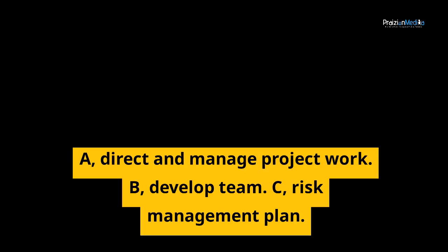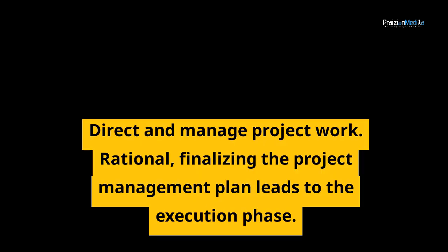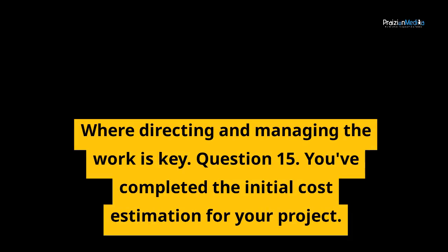A. Direct and manage project work. B. Develop team. C. Risk management plan. Correct answer A. Direct and manage project work. Rationale. Finalizing the project management plan leads to the execution phase, where directing and managing the work is key.